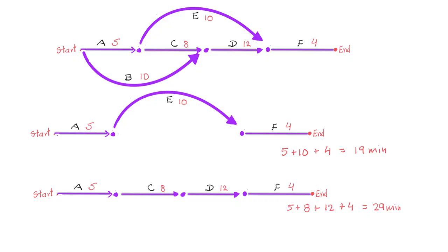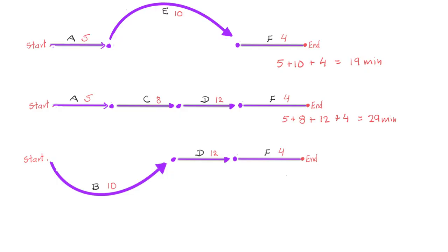Let's take one more path, and that's going from here, B, D, and F. And this path will take 10 plus 12 plus 4, which is 26 minutes.